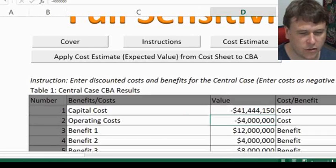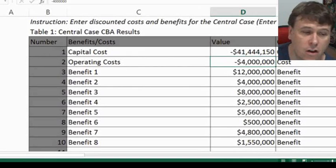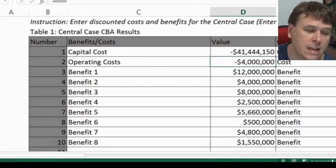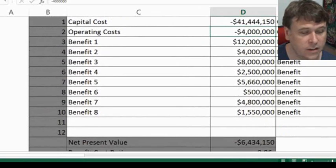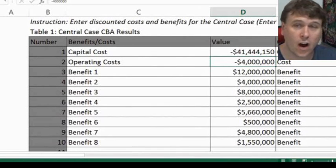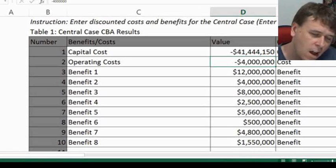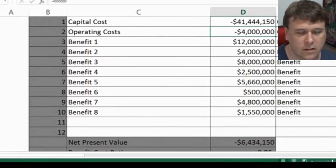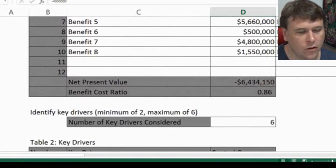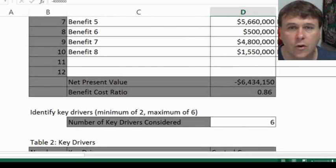Once you've pasted your results out of your model, you need to identify whether they're actual costs or benefits. You've got your capital costs and your operating costs. You could have operating cost savings, which you could treat as a benefit. We've got benefits from one to eight, and you can have an additional two more benefits if need be, allowing for quite a variety. We've also got your net present value and your benefit cost ratio — the model actually recalculates that, but it should be the same values you're getting out of your model anyway.